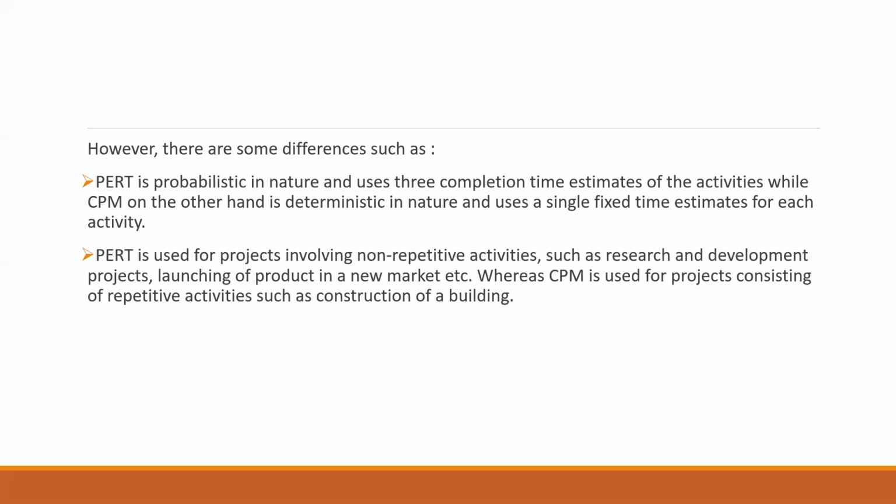The second difference is that PERT is used for projects involving non-repetitive activities, where the time durations are uncertain. For example, research and development projects or launching of a product in a new market. These can be some examples for PERT. So if you have projects where there are non-repetitive activities, please make use of PERT.